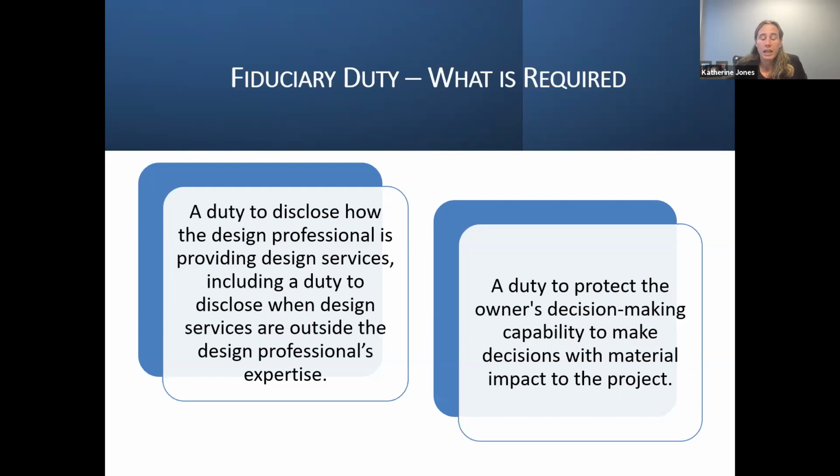But at the end of the day, it ended up being something about, like $100 more per door handle. And when you multiplied that across 1,500 door handles, it ended up being a $150,000 surcharge to the owner that the owner never had any knowledge of. And so if you have a fiduciary duty, that's not really acceptable, because you need to tell the owner that you're going to have this cost increase if you make this design change, finish change on a door handle, so that the owner is able to make those decisions on their own.